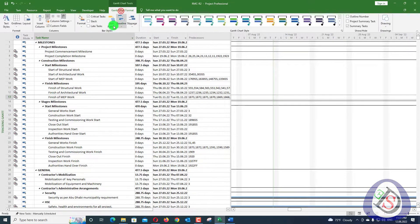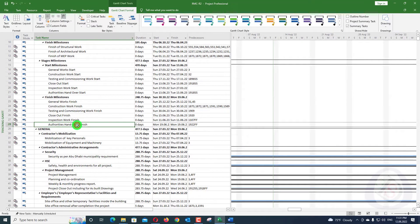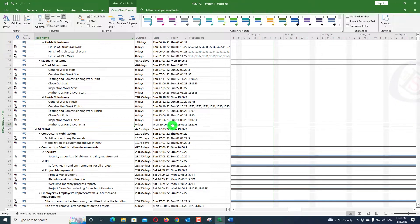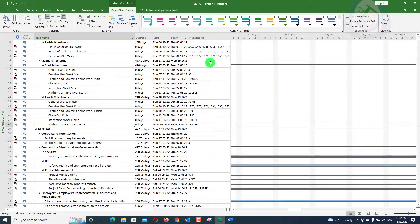First, I will show you in the Gantt chart the function called Task Path. When we select an activity — for example, this milestone — make sure that when you are checking for the driving predecessor, you select a milestone. A milestone pulls in all the activities between the previous driving predecessors. When we select 'Driving Predecessors,' it will highlight all the activities between them.